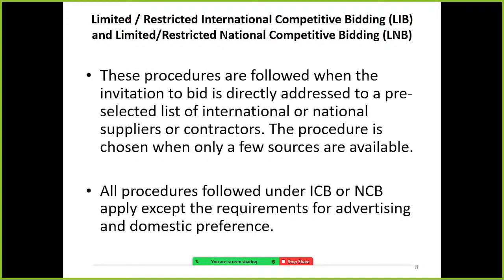Now we will see the limited one. Earlier, international bidding and national bidding are open. Here we see the limited or restricted international competitive bidding or national competitive bidding: limited international bidding, limited national bidding. These procedures are followed when the invitation to bid is directly addressed to a pre-selected list of international or national suppliers or contractors.